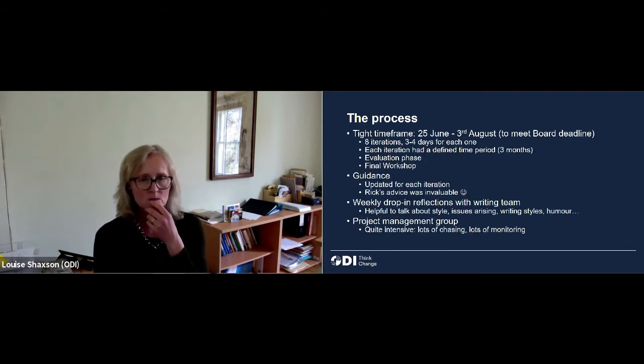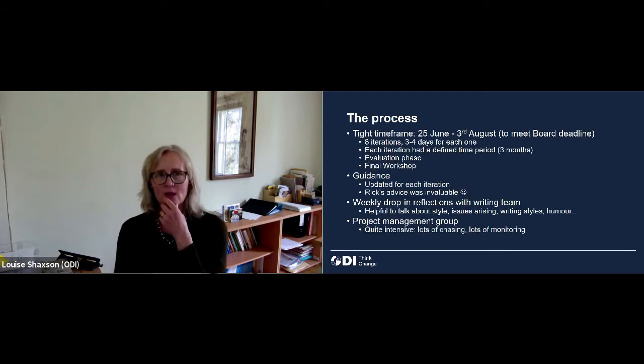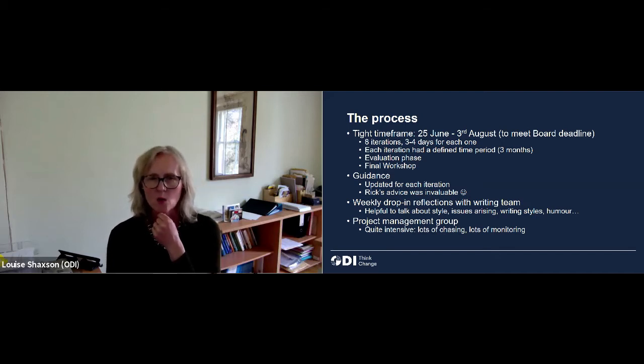Thanks. So it was a very tight time frame, because we had to meet a board deadline. That limited us to 8 iterations. We did quite a lot of planning around that, and left a couple of days of wiggle room, because we anticipated that there might be a little bit of drop off in enthusiasm. We might need an extra day to chivvy people along and say, yes, you really do need to make your inputs. But it did work out quite well.